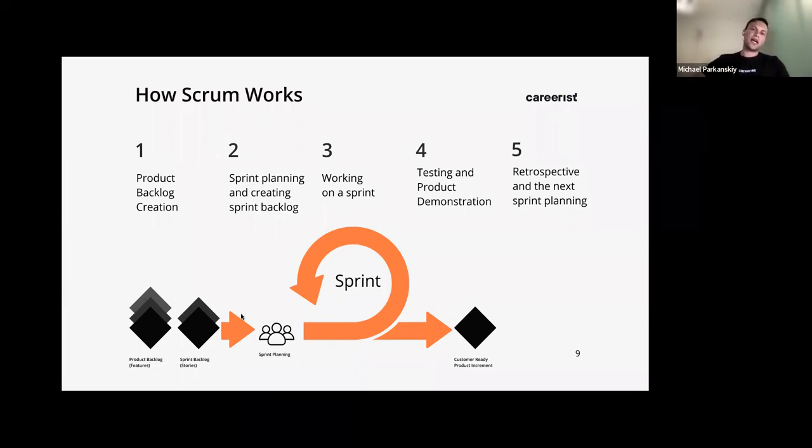The sprint after that, let's say the next sprint comes along and the developers say, okay, we're finished building it, now we're going to give it to you to test. During the next sprint, you're going to say at sprint planning, okay, developers on Friday were able to build what they were building, and for the next 2 weeks, I'm going to be testing.